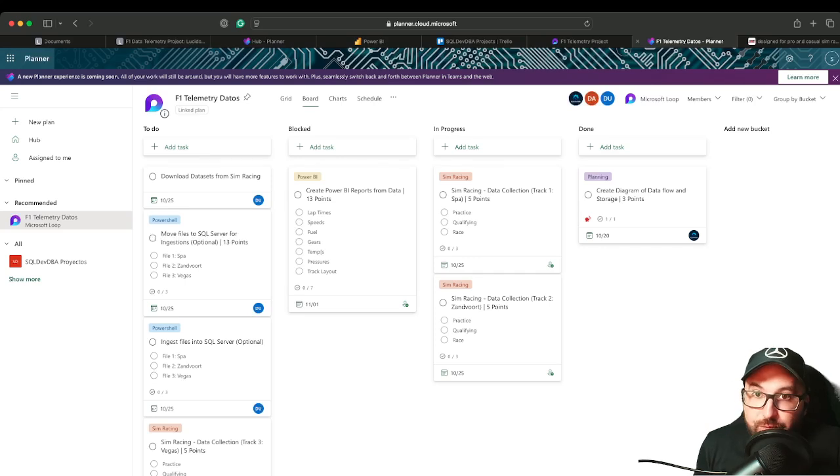Maybe it's a way for me to also tell if someone has an emergency and they need to be out half of the week or half of the sprint urgently. It allows me to redistribute the work. Maybe I see a 5-point task that they have and I try to help, or I try to pull in someone from another team to help, or I engage and try to collaborate with one of the remaining team members and see if we can both help this task out. We can't do that for a 21, but we may be able to do that for a 5-pointer, as you can see here. So that's really important for you to understand as well.